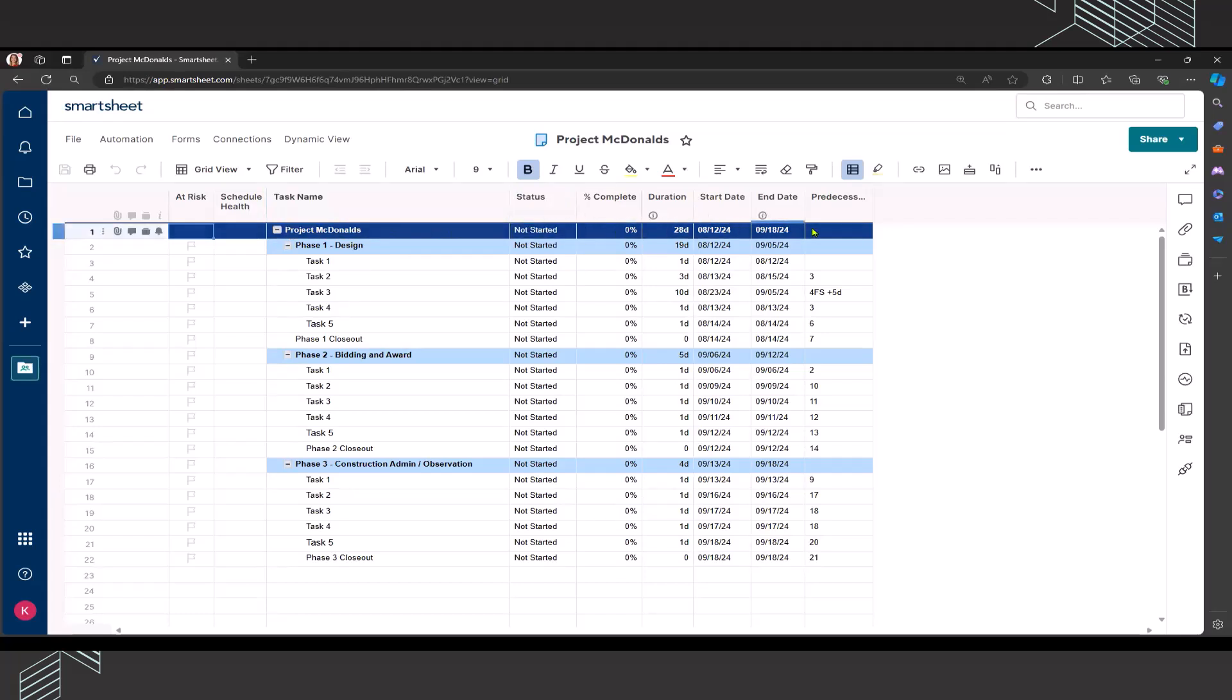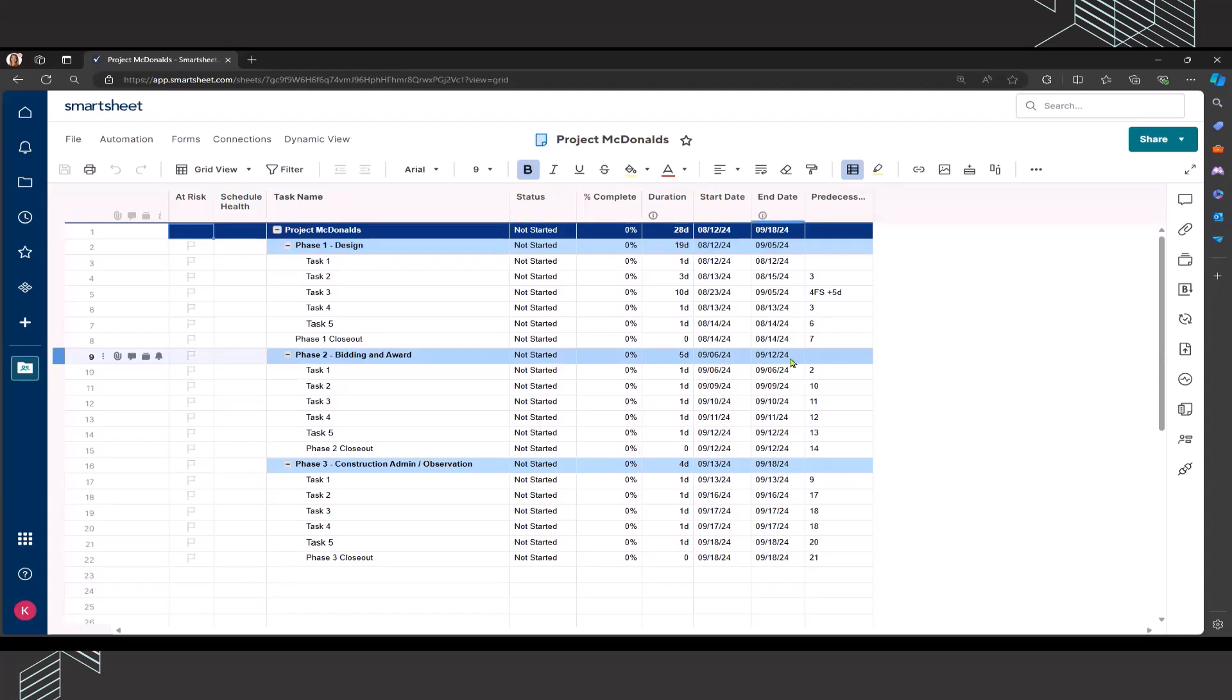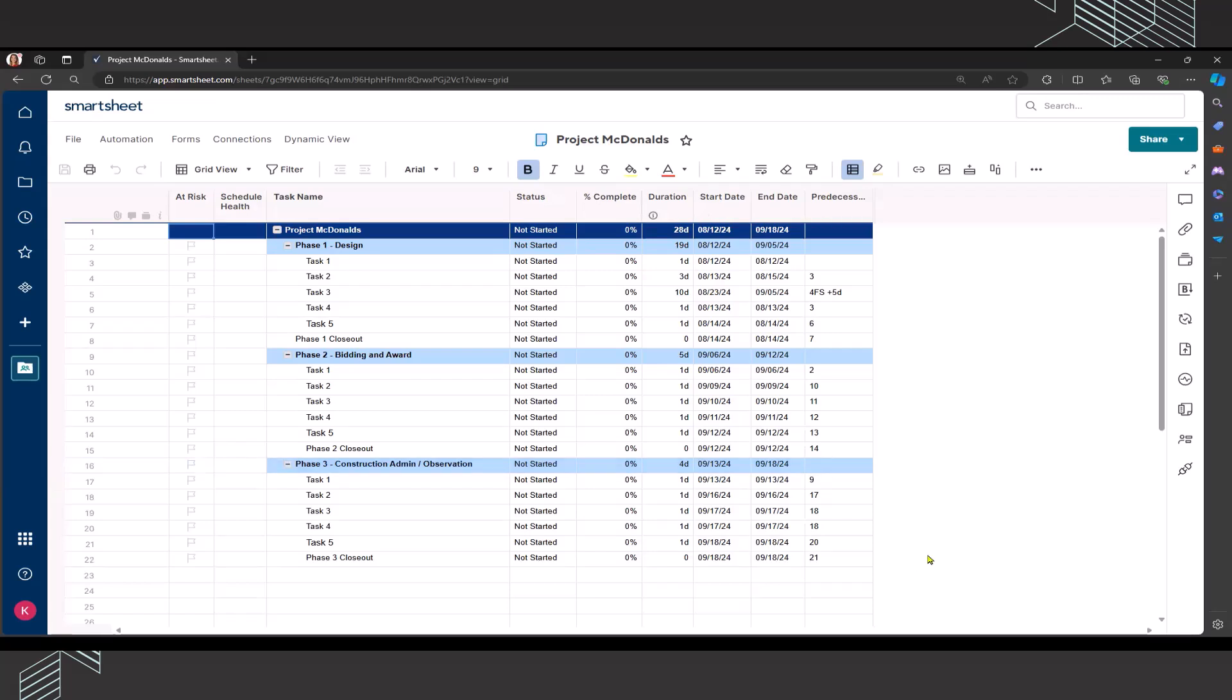So this is level one, my project level, divided into phases. So phase one is design, phase two is bidding and award, and phase three is construction admin/observation. I don't have any resources assigned right now, and that is on purpose because I want to show you what happens when you enable your workload management.